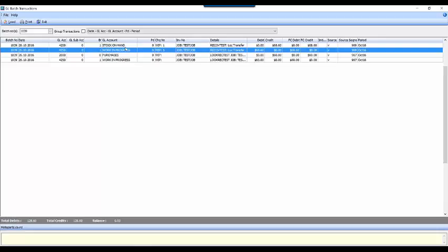Work in progress should be reconcilable, so we can run reports for you, put reports in place for you where the value of your work in progress can be broken down to every single line on every single job that's at a work in progress or ready to invoice status. They will be what makes up your work in progress. So it's pretty straightforward, but that's one of the connections that sometimes people don't automatically make: that's what results in the work in progress in your balance sheet, is the addition of lines to jobs at work in progress or ready to invoice status. They are the value of your work in progress in your balance sheet. So that's just a wee connection you can draw now.